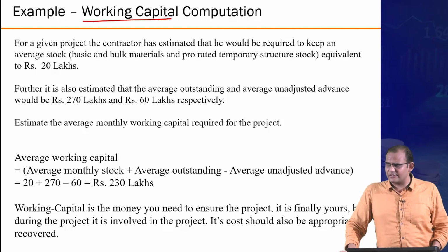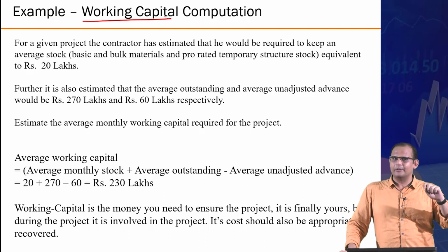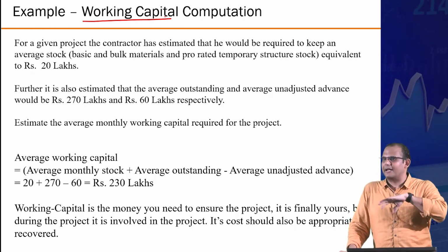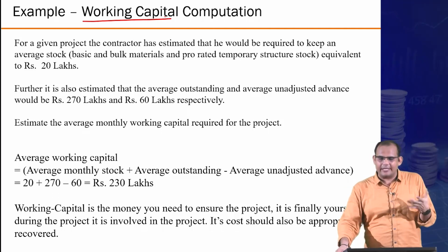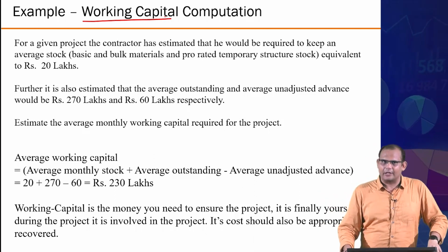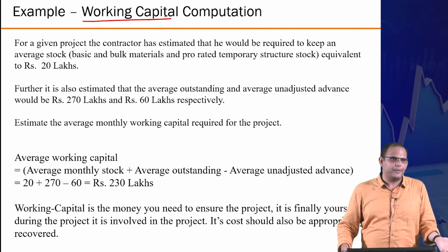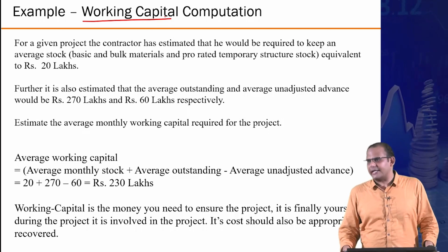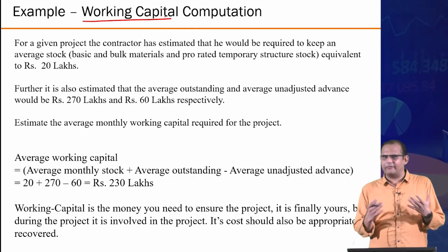Even in the construction industry, we do have a credit system. For example, you have a personal credit card where the cost is now, but you promise to pay it 1 month later when your salary comes. Same thing happens even in the construction industry. The industry in general works with a lot of informal relationships. So, for example, the contractors also might negotiate a deal with the vendor that, hey, I will not pay you every day. It's too much work to just pay you every day. I'll pay you maybe every 15 days or maybe every 10 days after you have supplied the material to me. So, these kind of things happen.